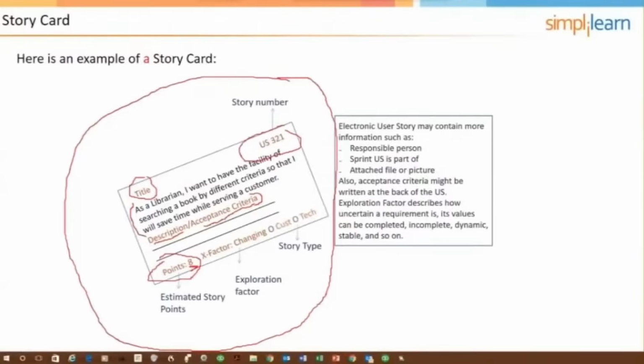It's not listed here, but there's probably going to be a value point assignment. This is where the product owner determines in a relative way the value of the stories. Just like we were doing in planning poker, the product owner might say, well, this story is twice as valuable as this other one, comparing them together. These value points are what's used to prioritize the user stories. That's supposed to be a V, as in value points.